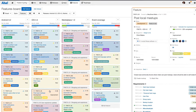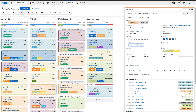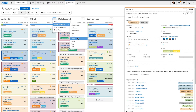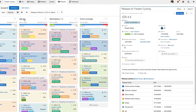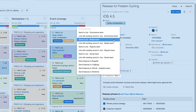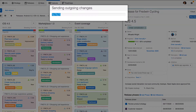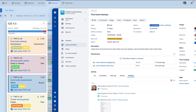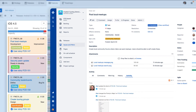First, you define your strategy and prioritize your features in AHA. Then, you send your prioritized list of features directly from AHA to your development tool. As engineering updates the status of features and logs the percent of work completed in their development tool, you can stay informed of progress without ever leaving AHA. This way, both teams can seamlessly collaborate on requirements, communicate changes, and track progress throughout the product development process.